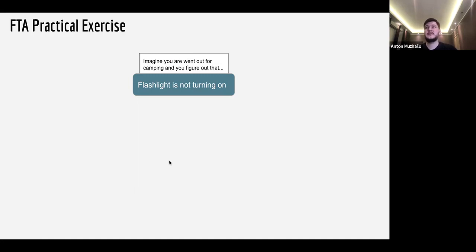And the last important challenge is to maintain these risks regularly. So you need a so-called risk management committee that will gather once a month, let's say, and review all the risks again to see which of those were decreased and which of those are not.